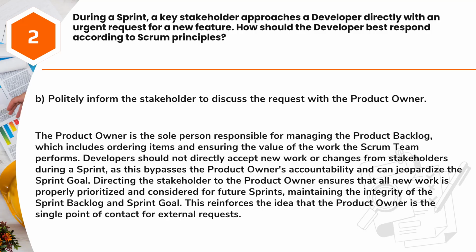Directing the stakeholder to the product owner ensures that all new work is properly prioritized and considered for future sprints, maintaining the integrity of the sprint backlog and sprint goal. This reinforces the idea that the product owner is the single point of contact for external requests.